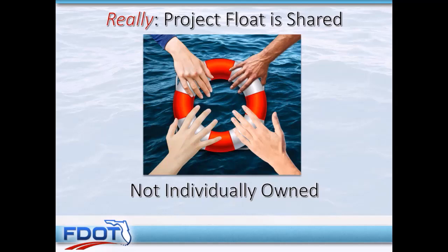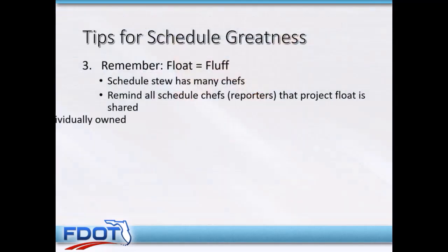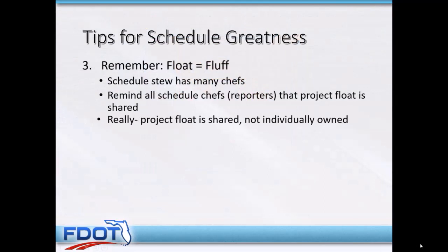Back when I was in District 1 in a production meeting, there was a gentleman whose activity, they asked him if he was going to get that done on time, and he says, I'm going to meet that late date. In other words, he was wanting to be Ed McMahon, and somebody in the room said, no, I think you need to try to be the nerd, because if you're Ed McMahon, then basically you've eaten all the positive float, and everything has to be perfect from there on out to meet the schedule. Good things bear repeating. Really, project float is shared, not individually owned.